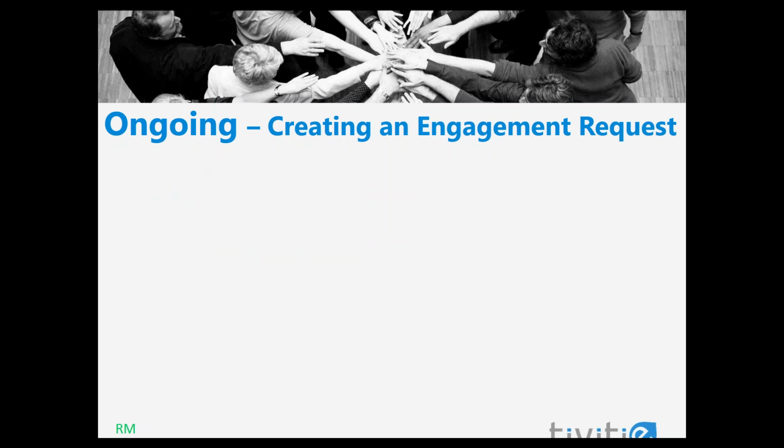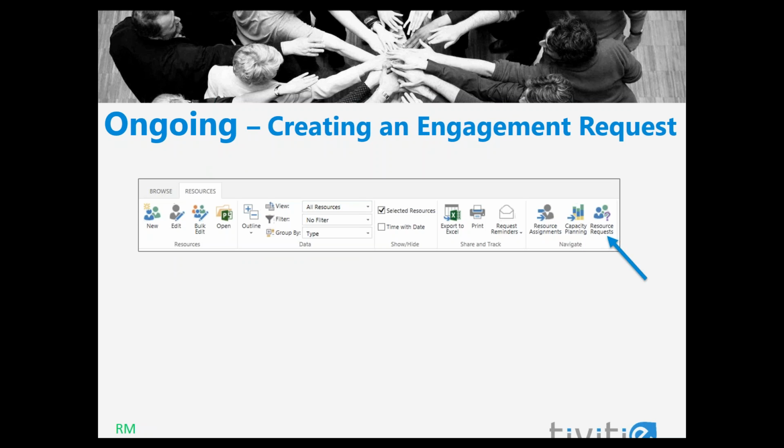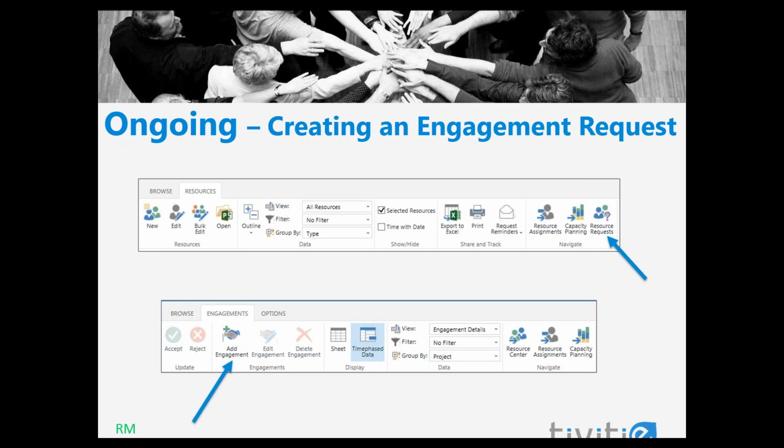The Resource Manager may also create a brand new resource engagement. From the Resource Center, select Resource Requests from the Resources tab. The resource that the resource engagement is being created for must be selected in the Resource Center prior to selecting Resource Requests to be included. Then from the Engagements tab, select Add Engagement.